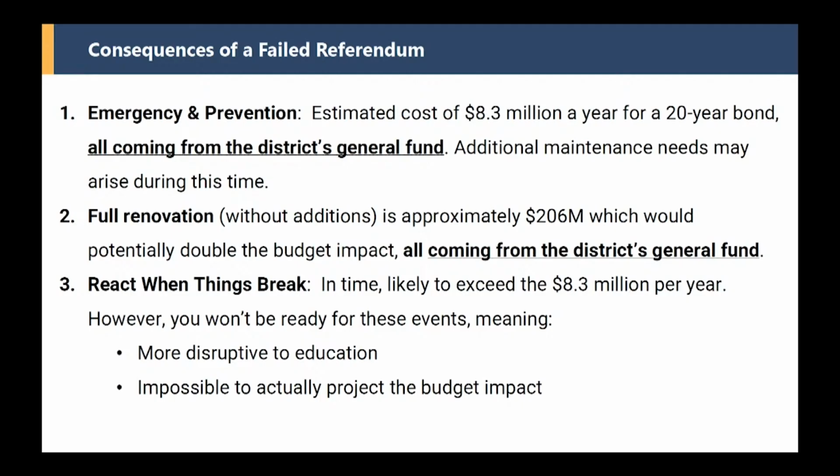I have a question regarding the time frame that would be predicted to finish your warm, safe, and dry approach to needs at the middle school. Yeah, so you would still have about a 12 to 18 month design and permitting process, and then you still have a 3 to 4 year construction cycle. So don't have all that nailed down exactly, but somewhere in that range would be an expected time to complete.